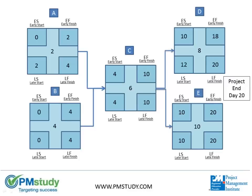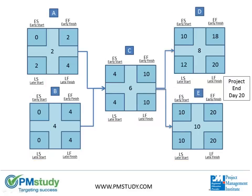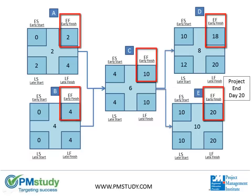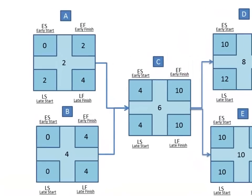To calculate float for each task, we subtract the early start from the late start or the early finish from the late finish. Either of these two variances will determine the float and will be the same number. Let's pick the late start minus the early start, or two minus zero.